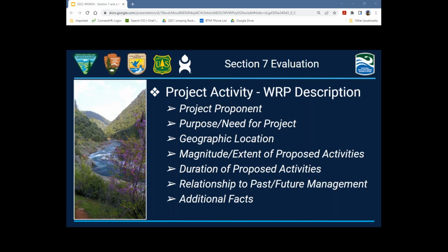Some of the stuff you only have to cover once in the NEPA analysis or the Section 7, but they need to tie to each other. Information may also come from project submittals to state and local governments. It is the project proponent's responsibility to get the Section 7 agency the needed information. We don't necessarily provide that when they come in with nothing.